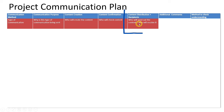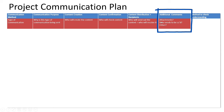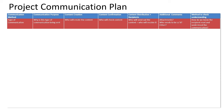Content distribution and recipients — who's going to send it out and who will receive it? Not all communication is going to be sent from the same individual. For example, I may create an announcement that I need the president of the organization to send on my behalf. Additional comments cover attachments, who needs to be CC'd, and the method to check understanding — how do you know that your communication was read and understood?